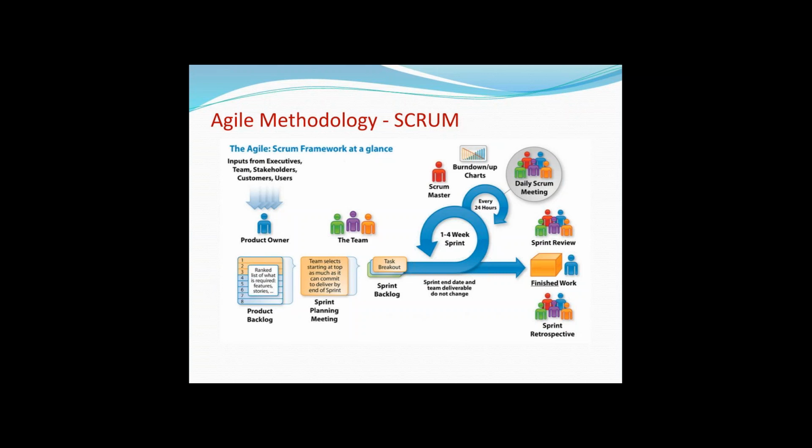So in the first sprint, I will take those user stories or those requirements which have lesser dependencies. Okay, so let us say that once you log into the application, you go to your home page where you have all the transactions listed. So if you want to go to that page, you need to have a login page ready, a registration page ready, a database ready, some set of code which needs to be ready, right? So you will not directly jump into that requirement. First, you will take the requirements which have lesser dependencies on others. So when I say lesser dependencies, a simple example I can say is, let's take a registration flow and a login flow in the first sprint.